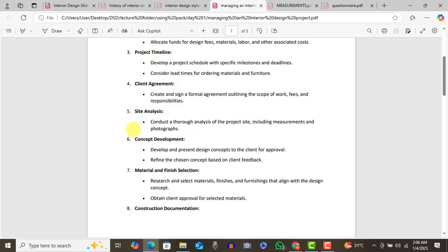Otherwise the people are there and you are now thinking, oh, what are we going to do? The soil today, it has rained. You should be able to go on site and have a site plan, like an analysis. When a big truck comes, where are they going to turn? How are they going to park? What can we place over this side? How are we going to get these items upstairs? What must be done before what? Do you get it? You must have a comprehensive plan.